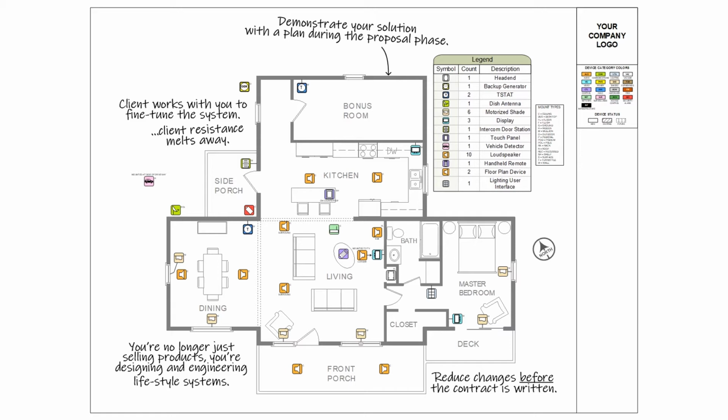And after closing the deal, this drawing is shared with the client to confirm what is being installed and where it's being installed. Getting this drawing confirmed before any installation work is done is the foundation for a successful installation. This drawing also lays the groundwork for creating all the other drawings.